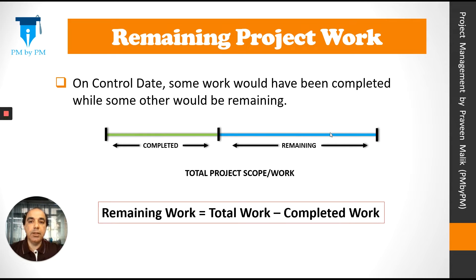On a control date, some work would have been finished while some other work would be remaining. The control date is any date in between the project where you are measuring the performance of the project. If you look at this diagram, green signifies the completed work whereas blue signifies the remaining work. The remaining work is equal to total work minus completed work.